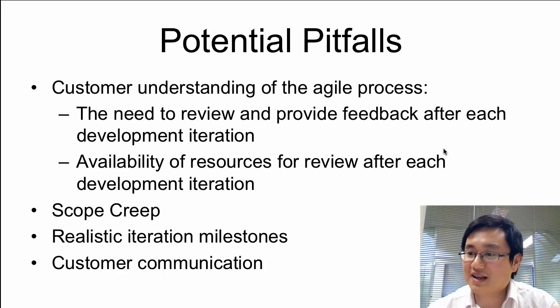Thirdly, try to set realistic milestones for each development iteration. I generally consult with the development teams to see which functions naturally lend to being developed together, and I tend to set each iteration period to be between 2 to 3 weeks in length.